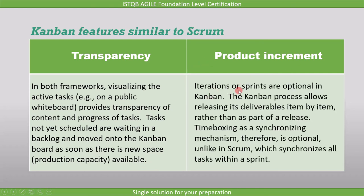Iterations or sprints are optional in Kanban. The Kanban process allows releasing its deliverables item by item, rather than as part of a release. Timeboxing as a synchronizing mechanism is therefore optional, unlike in Scrum, which synchronizes all tasks within a sprint.